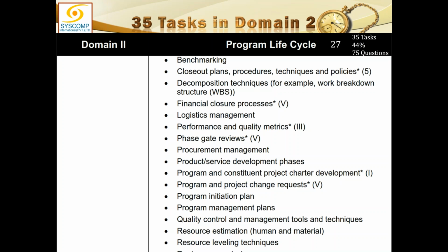No problem. You see, you have divided your project into a number of phases, right? When you complete one phase and there is a closure of that phase and a deliverable coming out of it, that is the point of review. There you stop and look back to see how well you have performed, and you seek approval of your sponsor, who will allow you to move ahead. This is a phase gate review.